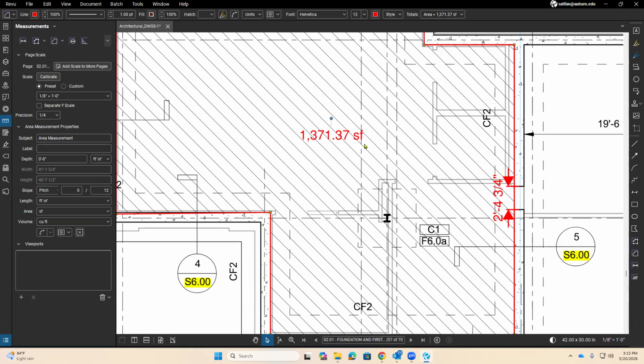Does that make sense? How many cubic yards of concrete is that if it's going to be a 6-inch slab? How do we calculate that? Times 6/12, first of all, because then we get the value in cubic feet. Because volume of concrete is cubic feet.